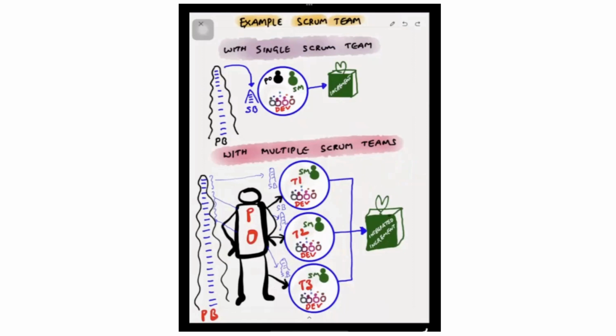So in this multi-team environment, a few things need to be taken care of. The first thing is sprint length. It is good to have all three teams following the same sprint length. It could be any length less than or equal to 1 month. It could be 1 week or 2 weeks or 3 weeks, whatever is possible. It is recommended to have the same sprint length for all these three teams because it will help them maintain cadence plus synchronization.